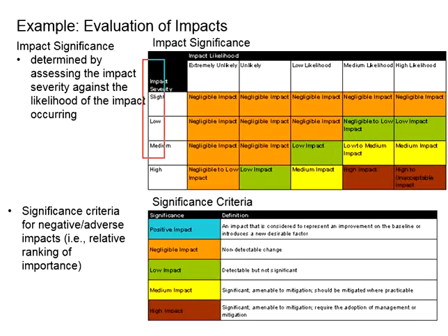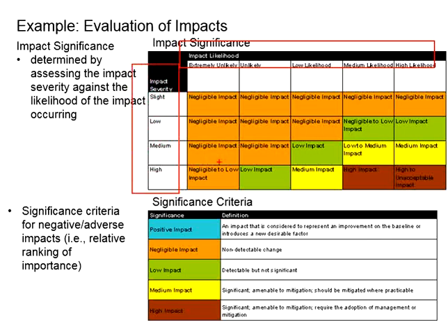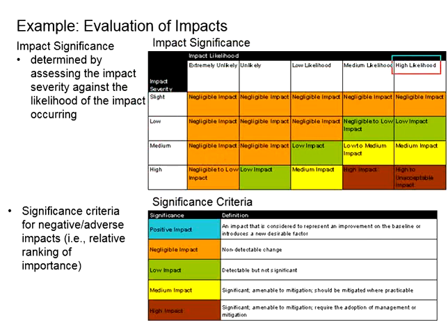Next, you may compare the 2 parameters: the impact likelihood against the impact severities. Those with high likelihood and high severity can be rated as quite significant, which will require mitigations, and those with low likelihood and insignificant impact can be considered as negligible impact, where mitigation measures may not be compulsory.